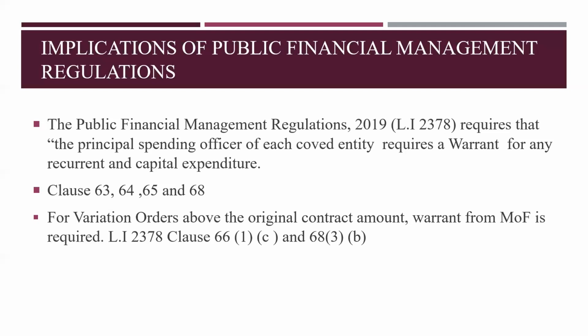management regulations, and they are ensuring that before we commit the government of Ghana to that expenditure, we should have gotten approval clearance from Ministry of Finance or Road Fund, indicating that they have made provision for the additional works that we are adding on to get the project to be executed. They also understand that normally we need these variation orders to make the project functional. Otherwise, we may have to curtail it at a certain point. So it is our actions or inactions or documentation wise that is making some of the approvals a little difficult for us to be able to obtain.